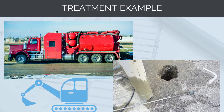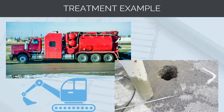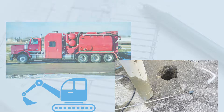As an example, on a project I was working on, there was a significant amount of trenching and mechanical excavation in a busy suburb with utilities in the ground everywhere. As a control, to avoid digging up a power cable, gas line or telecommunications conduit, we would non-destructively excavate around services using vacuum excavation — NDD trucks that suck out the ground around services so we can safely dig past them. Our budget for NDD was going through the roof. We re-forecast our costs and found the driver was poor survey data, requiring us to NDD services two or three times. As a consequence, we got the surveyors to fix up the data and provide a better set out of existing services to reduce costs. By understanding our budget, we identified a cause and put in place a treatment to reduce our overspend.